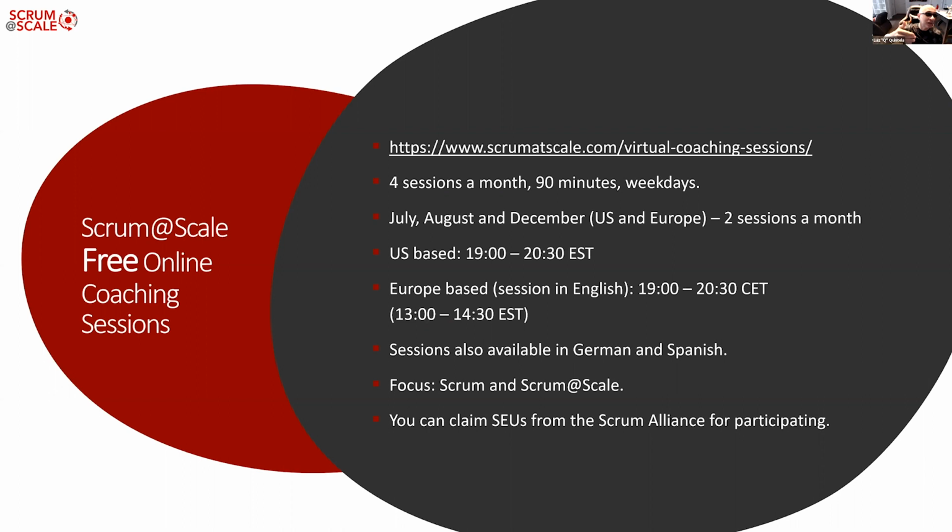Once you have the deliverables, that backlog is going to be decomposed and sent to groups of teams and then decomposed again and sent to the teams. So the difficulty is always to create the initial set of goals and have those goals in order. Then you figure out how you're going to meet those goals in that order. And orders may change based on market situations and regulatory things, which is really big if you are in banking or any financial stuff or healthcare. So that's basically it.